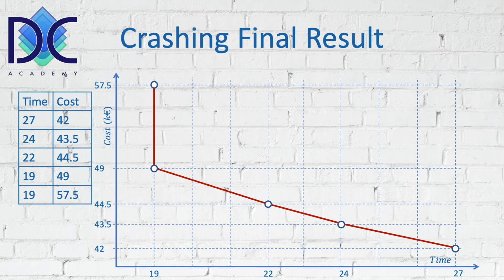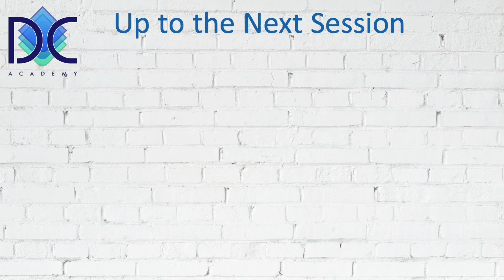So this is a relationship that can help you finding, in fact, the relation between time and cost. So when you have a certain limit set up, with this information you can determine the basic project cost, add your profit, add your additional costs, and give a price to your customer. So that was it for the activity crashing. It's rather complicated because there are a lot of calculations to conduct, and this is just one example. You can find other examples also on our YouTube channel.